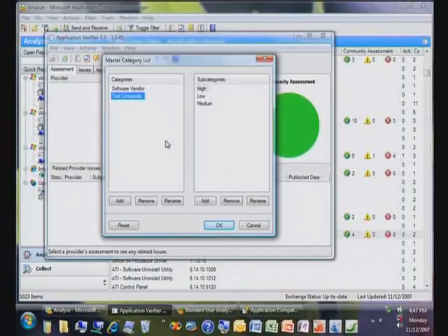Another very useful category, maybe I'm going to deploy by region. Because in addition to differing by role, because of export restrictions, I have some software I can't run in certain places, so I'll categorize by that as well. Another creative one that I found very helpful was, I'm going to put a category in here for who is the tester that I've currently assigned this piece of software to for testing, and who's the business owner. So I can track those people down and have a conversation that is, again, comprehensive, start to finish. Whether I use ACT or any other tool, that's important information to associate with that piece of software.